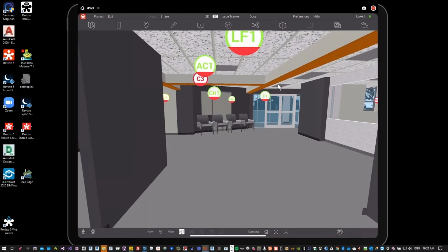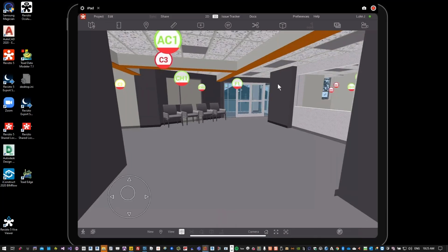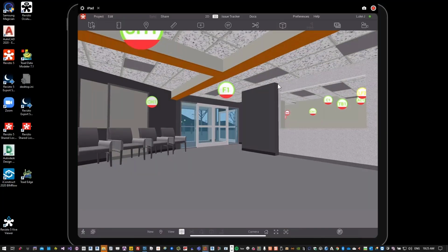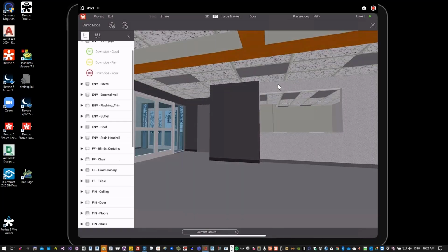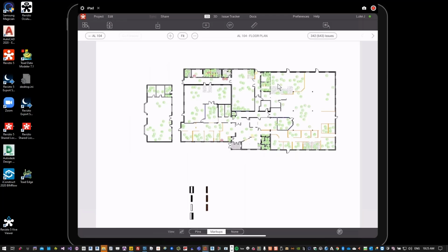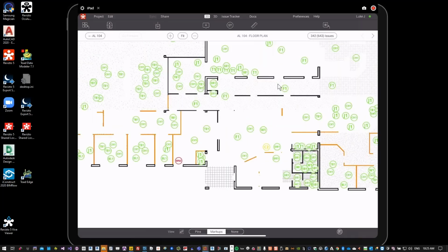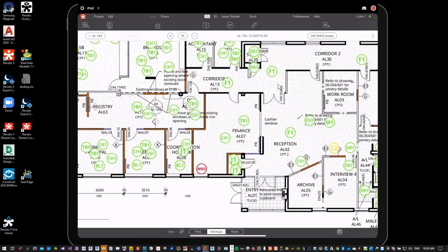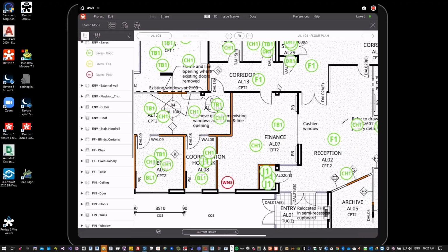First thing is, Revizto has the iPad app. So we've got the iPad app on the screen there. I don't know if you can see me and the iPad app at the same time. But basically we can walk around on site, and Stuart and his team have done this, and using the Revizto stamps, they've essentially captured conditions of a space using either the drawing or the model. So as you know, Revizto stores the model and the drawings, you can take it out on site. I think in this particular case, they either zoomed in on the drawing and then tapped the stamp list here and said, that's a flooring or something, and tap on the model to record the condition at that location.